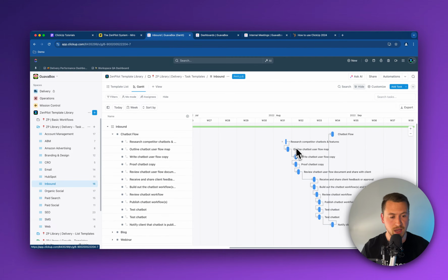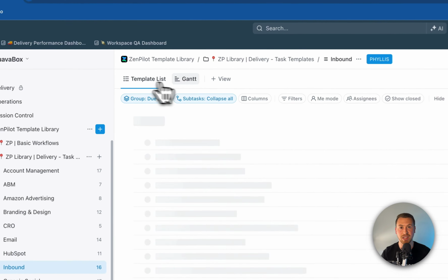And so I would say with this, one big thing, I do have another video on how to actually use dependencies that I'll put in the description below if you're more curious about that. But the big thing with this in terms of how this is set up is all of these tasks are going to flow like this. The last subtask due date should match the parent task due date, and it should block that. And I'll show you why in just a moment. But as you can see here, when the last subtask is done, the parent task is done. So that's a great way for us to show the client, if we want to give them a little bit more granularity on what steps we're doing, and if we have to push out a timeline, which I'll get into in just a moment. But that's a great way to build your workflow there, because again, when that last subtask is done, your parent task is also complete. So build those dependencies in there and then bring them with your templates, which can be helpful.